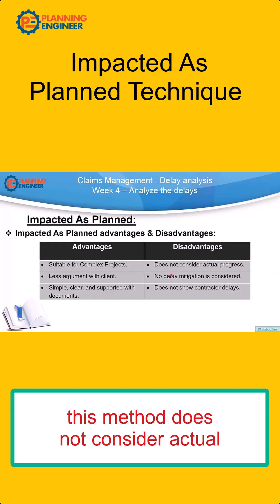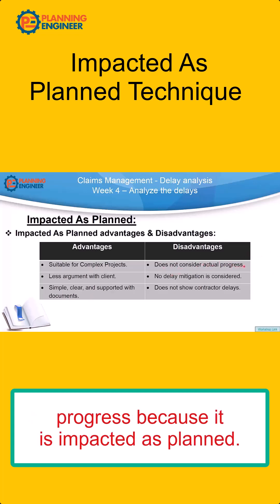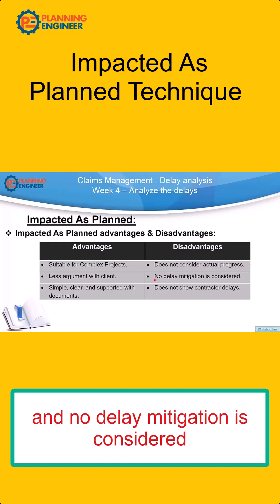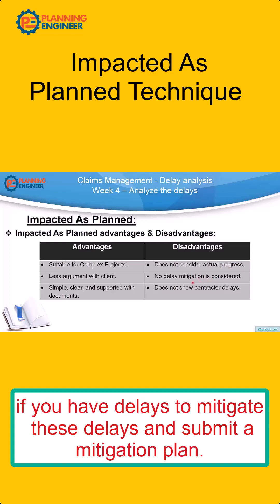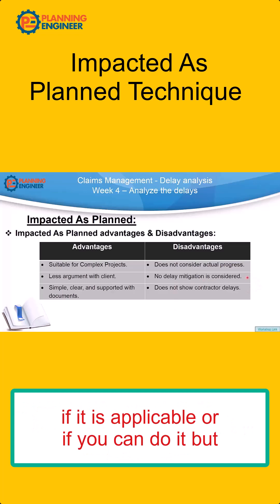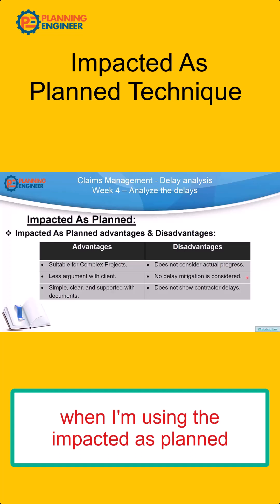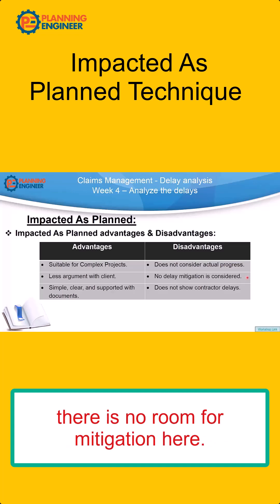However, the disadvantages of this method are that it does not consider actual progress — because it is 'impacted as planned' — and no delay mitigation is considered. This is important, because as a client, I would ask you to mitigate the delays and submit a mitigation plan if applicable.